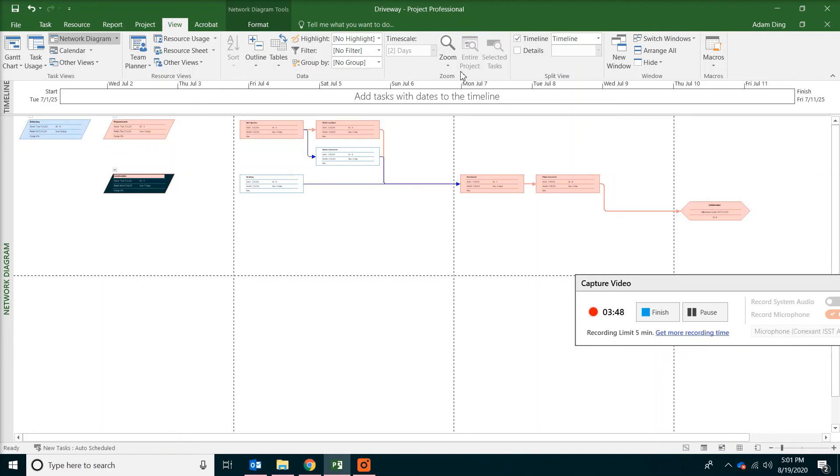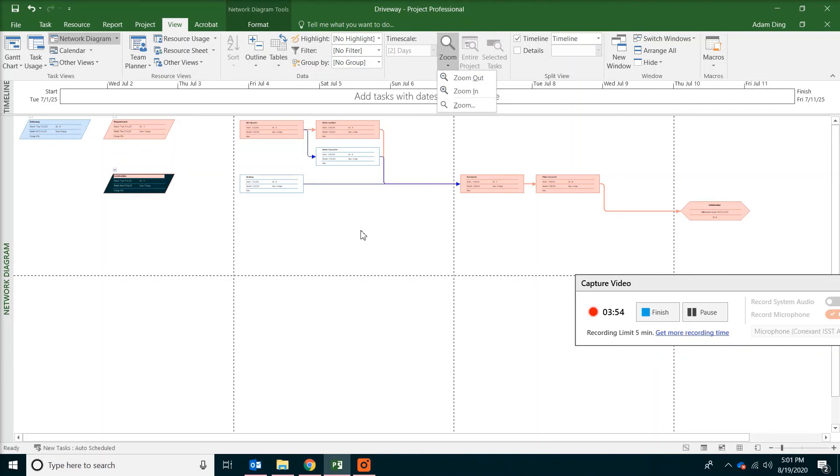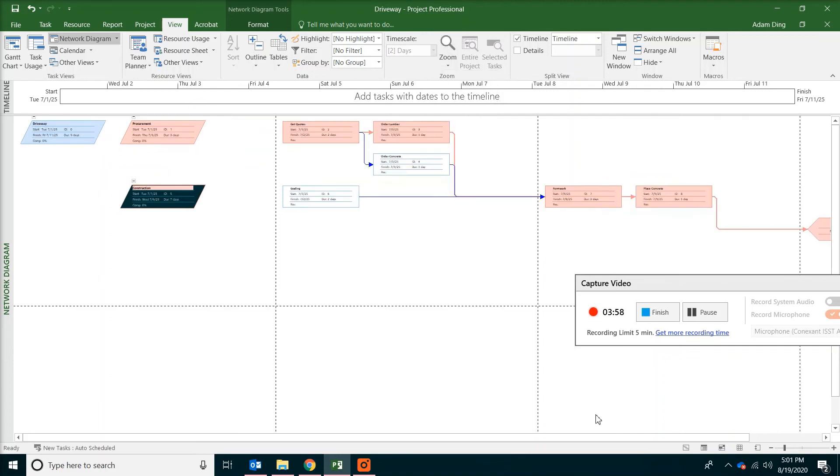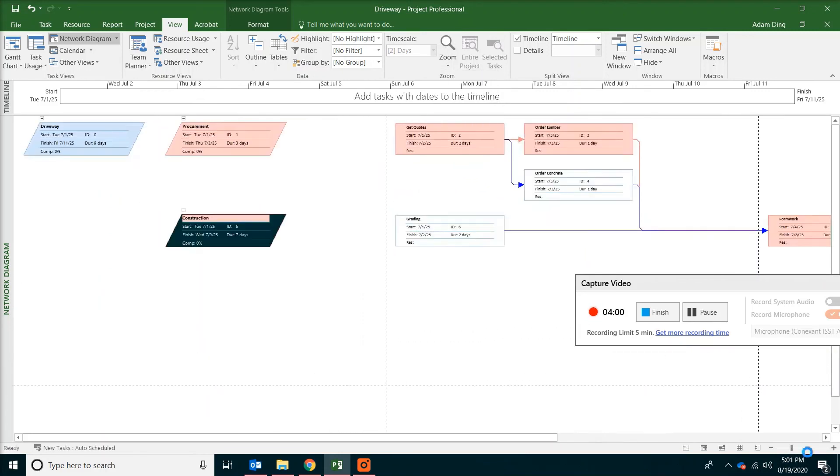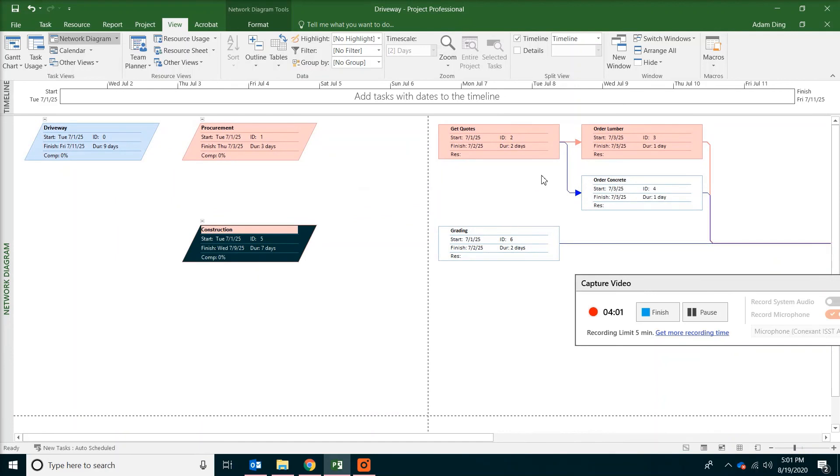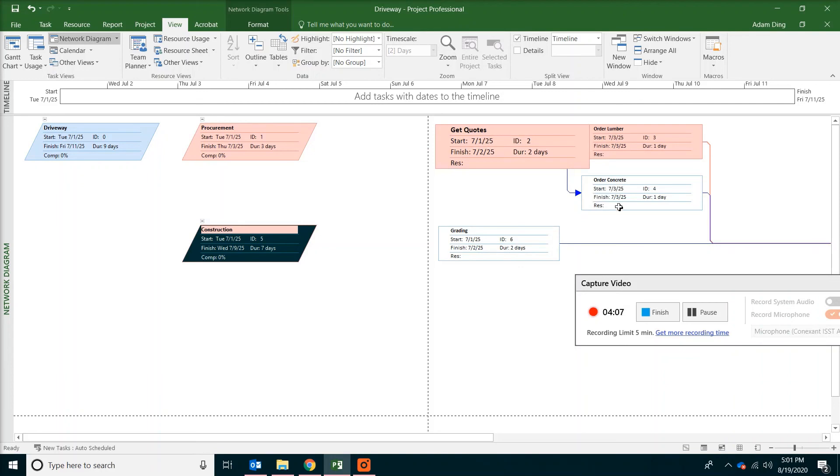The other way to do it is just to zoom in and zoom out on the top. So if we do want to zoom in and take a close look. By the way, anything that looks like red means they cannot be delayed. Those are critical tasks. And the white ones will be just not critical.